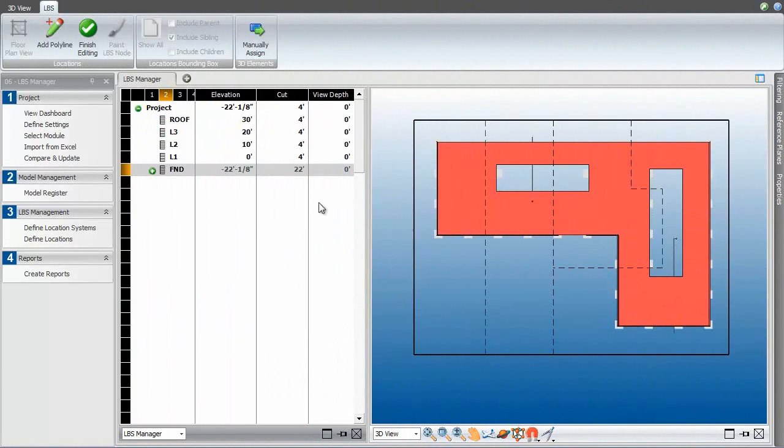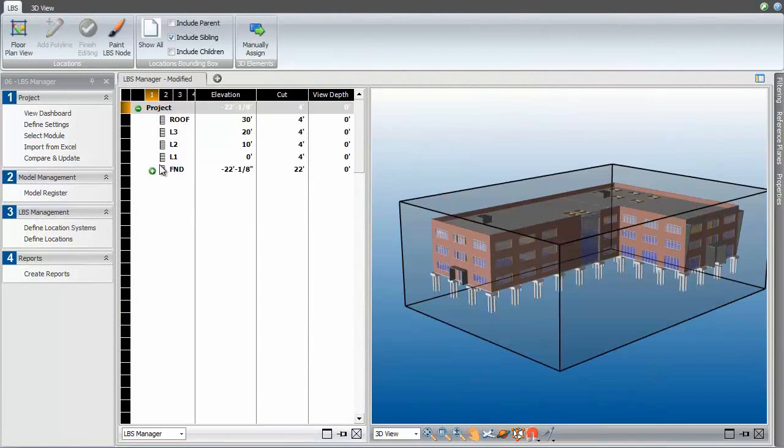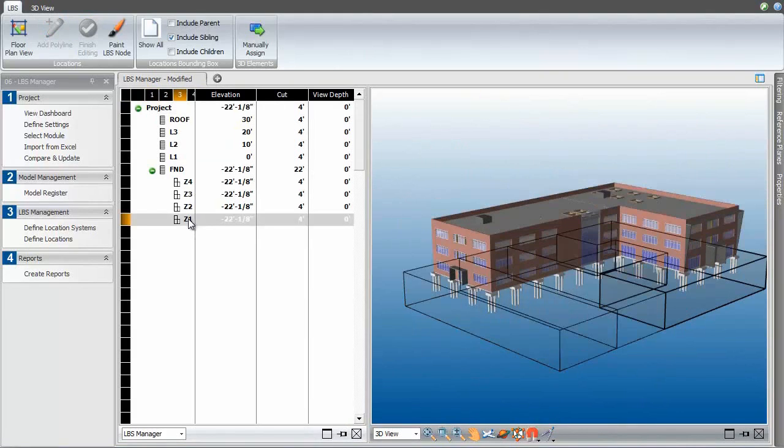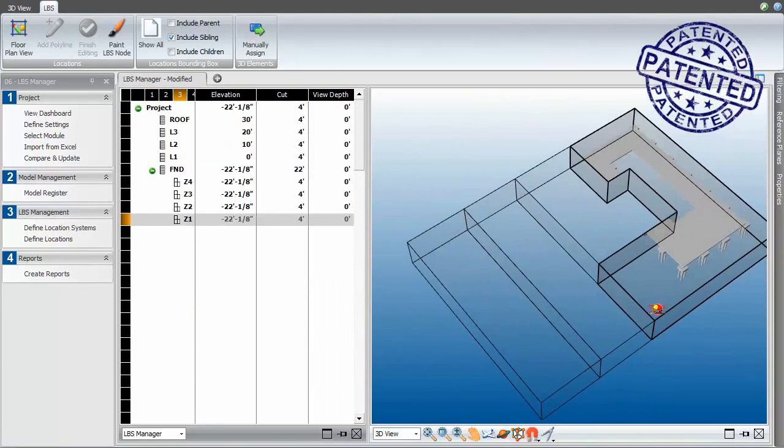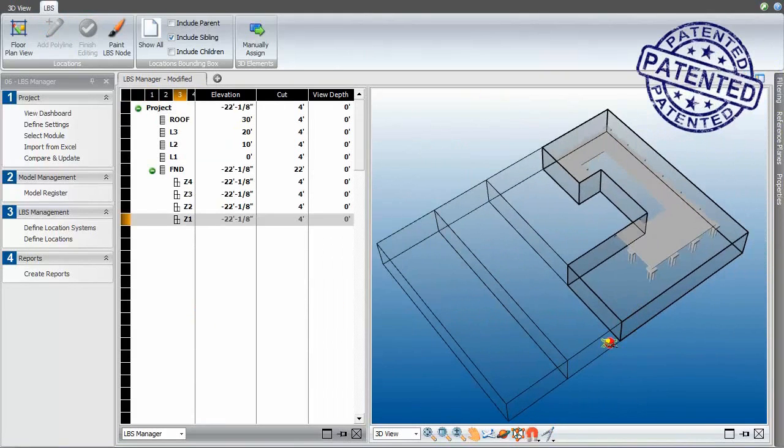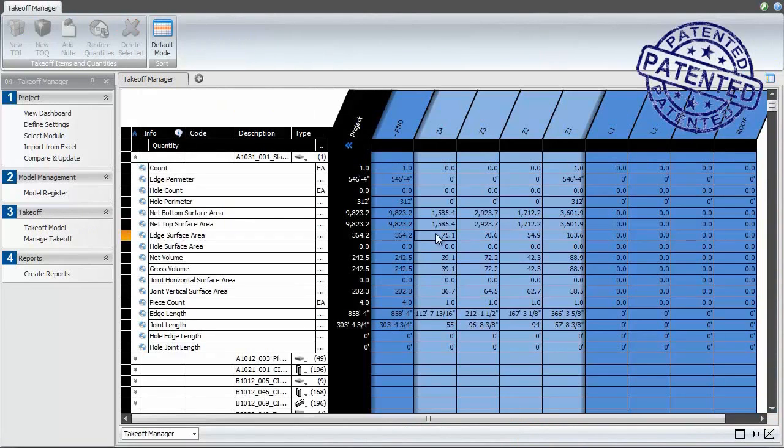Patented non-destructive location management then virtually splits model elements floor by floor and for each pour zone. This recalculates the quantities required in each of the project locations.